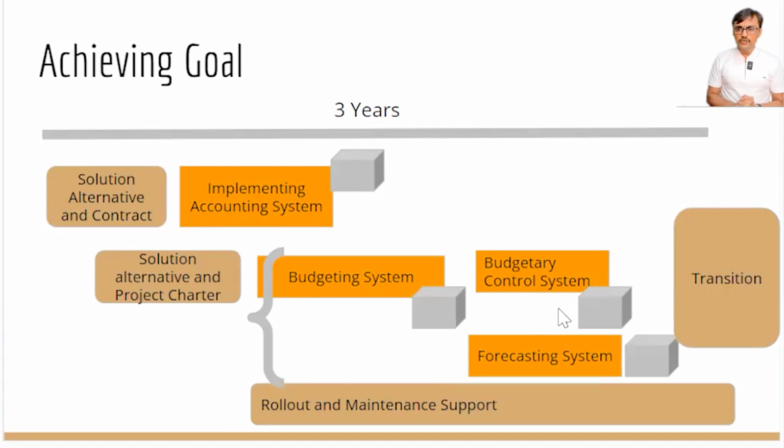There is a possibility you may have end-of-program benefits. Sometimes we call them unified deliverables or unified outcomes. In that case, until the program reaches its end stage, because all component projects are running during that time, there could be a closure in between, but benefits are not achieved. Only when the overall program gets finished do the benefits get achieved. So this is all about benefits and the component-level project relationship.